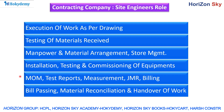The site engineer is responsible for Minutes of Meeting (MOM), test reports, measurements, JMR, and billing. Weekly site meetings are held with the client site engineer, engineering consultant or project coordinator, and the contracting company site engineer. During these meetings, they discuss project progress, any delays, and whether work conforms to provided norms and specifications — all of which is documented.